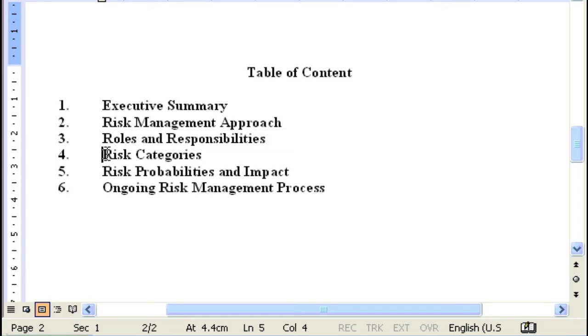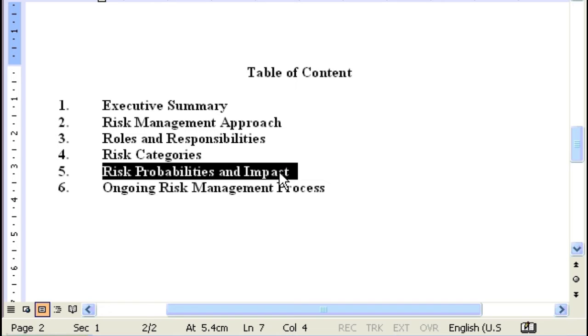You'll define the risk categories. How are you going to categorize risks? Categorize risk by technology, by human resources, by business, specific criteria, specific categories for how you're going to identify and categorize the individual risks that you're going to be tracking on your project. The risk probabilities and impact area essentially is the consolidation of our risk assessment and impact matrix. It's the process you're going to follow to categorize, to document, to understand risks on your project.